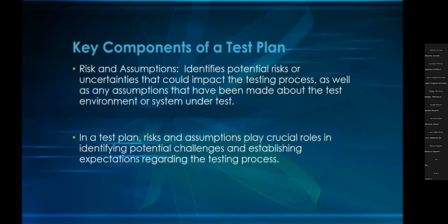So you also have risk mitigation, you also have risk monitoring and control throughout the testing process. The risks should be monitored regularly to track changes in their status and impact. The test plan should include a mechanism for reporting and escalating risk as needed, ensuring that appropriate actions are taken to avert risks in a timely manner.